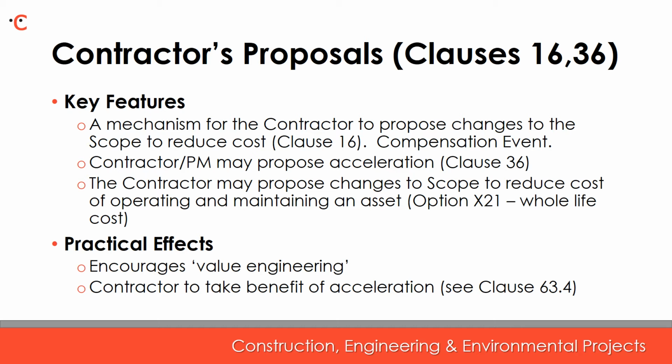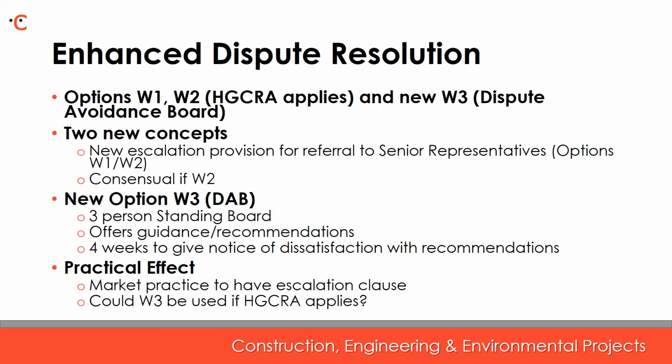Additionally, both parties now have a procedure whereby either of them may identify opportunities to allow joint discussion under the framework or other partnering arrangement, with a contractor getting to share in the cost savings of any opportunities that it may initiate. This should therefore help to improve overall project outcome and lower at least out-term build cost and time. It's to be seen as an incentive to the contractor to encourage proactivity and innovation in identifying opportunities for cost savings throughout the project.